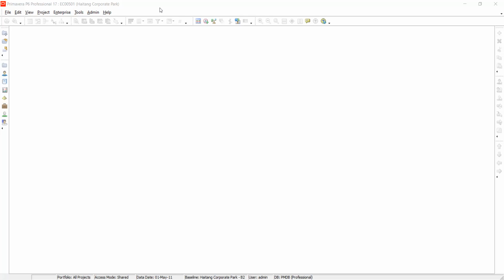Yeah, so different software use different methodologies to do resource leveling, but Primavera uses project priority and activity priority. What do we mean? Now, remember these resources, we tend to share them among different projects. Maybe you have a grader and it is the one working on this road and also the other one. Maybe you have the same designers that are being shared between different projects.